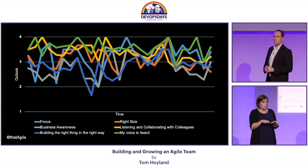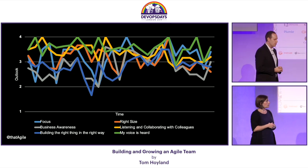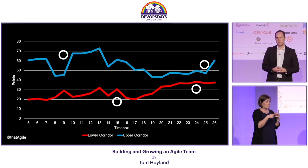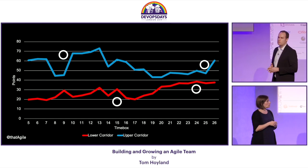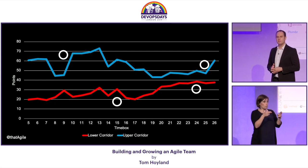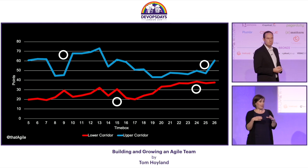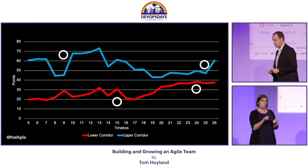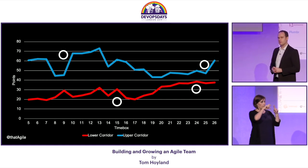The second thing that we did was we started to take all of that knowledge, all of that data, all of that information that we've been creating and collecting and piece it together and start to forecast forward. And so we started to use performance corridors. We looked at what the team was behaving like on a good day and a bad day. And then we said, as long as you remain within these two boundaries, you're okay. And this was incredibly powerful. This was about incremental gains, incrementally finding a way to deliver better products and operate our services in a better way.